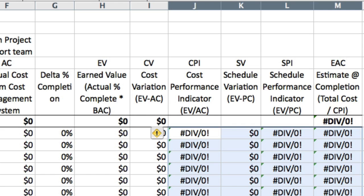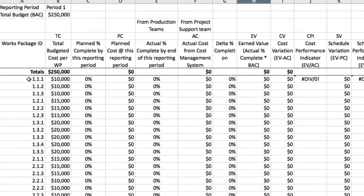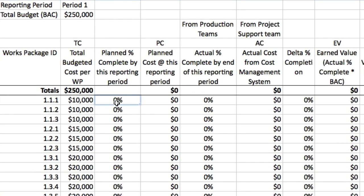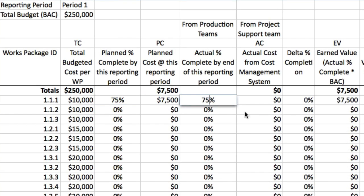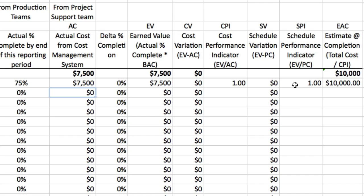Now let's time-travel to the end of the first reporting period. For work package 1.1.1, the planned percent complete is 75%, and the production team also reported 75% complete. The actual cost is reported at $7,500. So for this work package we are dead on track, with a CPI of 1 and an SPI of 1, and the estimate at completion in column M is the same as the budget in column B. Well done.